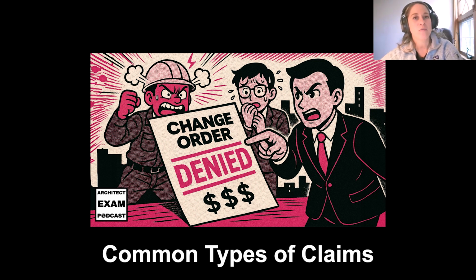If mediation doesn't go well and you need to go to the next step of the process, which is arbitration, that can take anywhere from 6 to 18 months. So you're really hoping to resolve this dispute as quickly as possible, but if you go to arbitration, it can take that long. And then lastly, which is the highest level of where this dispute can get to, is litigation, which can drag on anywhere from 1 to 5 years. And unfortunately, some projects do have to go through that if something cannot be settled sooner.